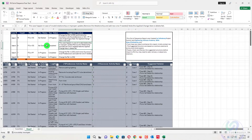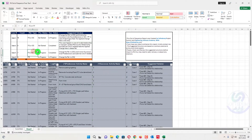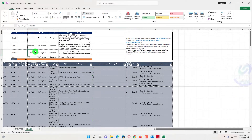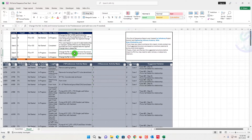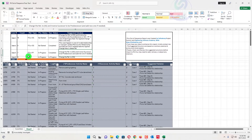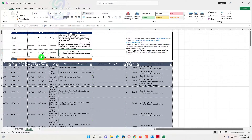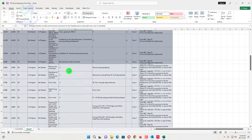In Case 2, the activity is not started and the successor is completed — just remove the relationship. If there are open-ended activities, assign a new relationship. In Case 3, the relationship type is finish-to-finish or finish-to-start, the predecessor is in progress, and the successor is completed — assign successor as SS and inverse successor to predecessor if needed. In Case 4, if the predecessor is in progress and the successor is also in progress, change the activity relationship to SS.